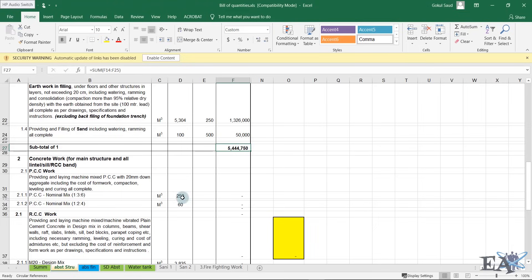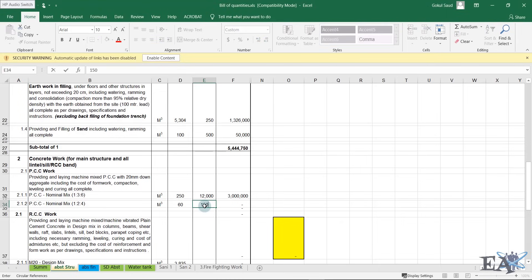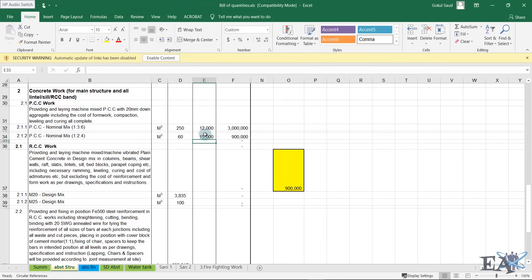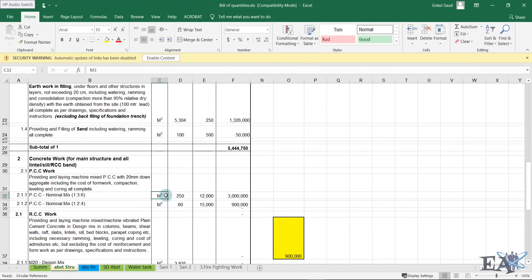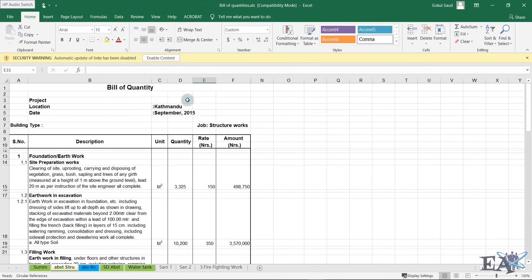After getting the subtotal for earthworks, you do the same for other works. For PCC M10 grade concrete, the rate might be 12,000 rupees per m³; for M20 grade concrete it might be 15,000 rupees per m³. Similarly for RCC works. Rates can come from two sources: experienced judgment based on project location and profit expectations, or from rate analysis of each individual work item. There are standard methods for rate analysis.